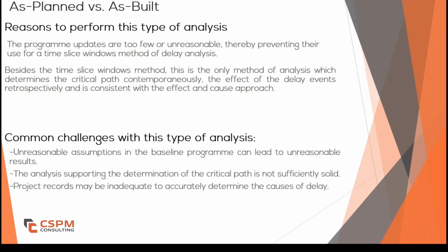The available schedule updates may be unreasonable or unreliable for proper analysis. If that's the case, using Windows analysis or impacted as planned methods may not yield meaningful results. Instead, we turn to as planned versus as built, where we rely on the latest schedule updates combined with project records to reconstruct what actually happened on site.